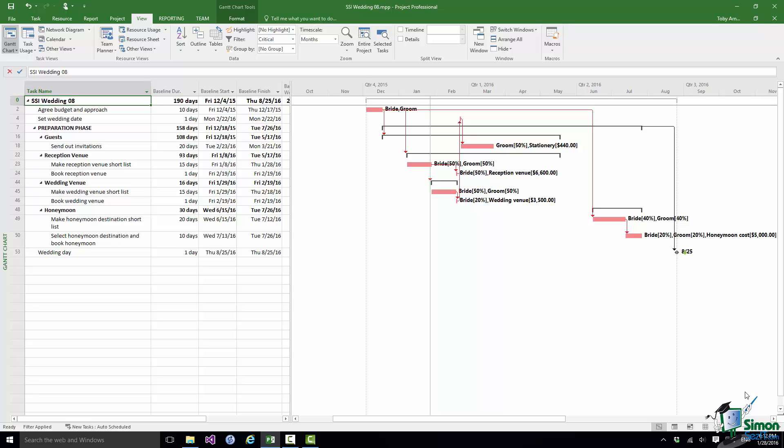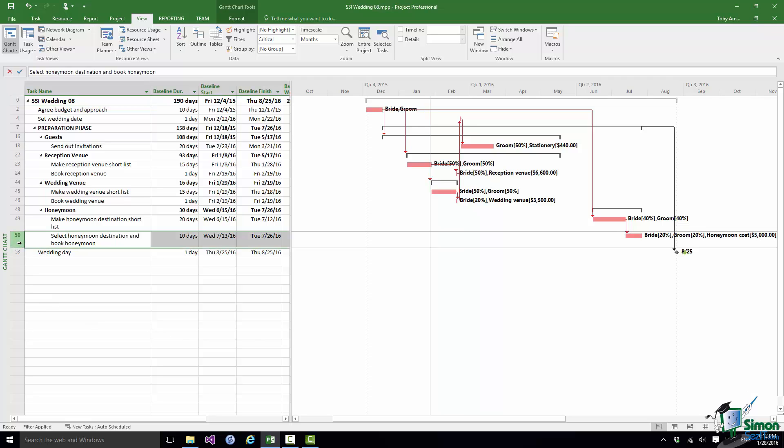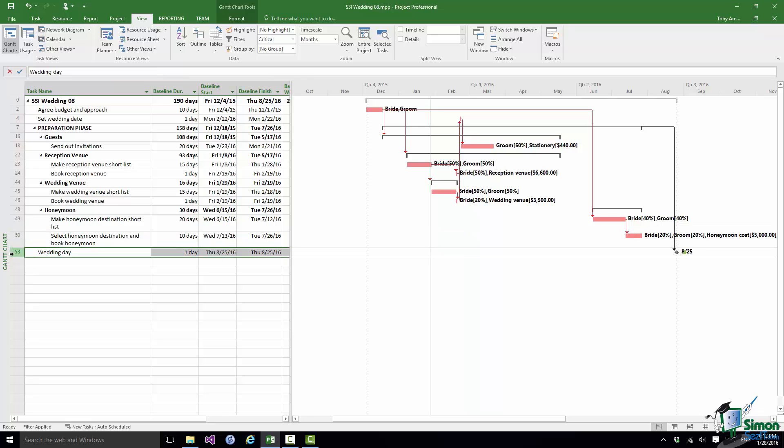I'm going to look first at the one towards the end. So this is the one that occupies quite a bit of August. And it's the gap after Select Honeymoon Destination and Book Honeymoon which is a critical task and Wedding Day which is itself of course critical because it's the end, it's the last day of the project. Now the reason there's a gap there is because I set up that 21 day contingency. So I said that Wedding Day is going to be 21 days after the end of the preparation phase. Now given the definition of what a critical task is, there are no tasks occurring in that period so none of them can be critical. So that's a perfectly legitimate gap in a critical path.